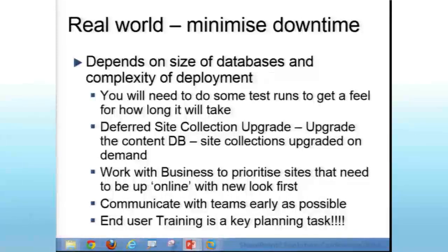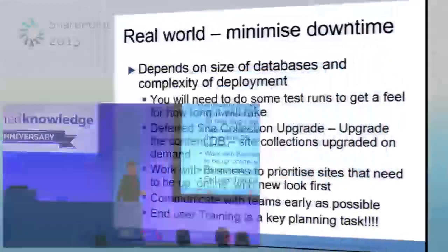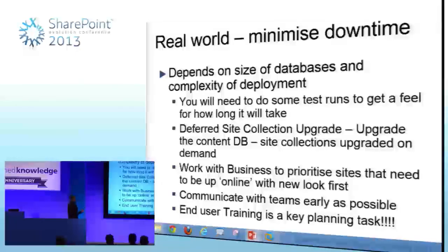Obviously, you need to do testing on how long it's going to take. There's no easy formula to say that content database is going to take 5 minutes or 10 minutes. You need to do a real-world test upgrade with real data a couple of times. I was working with a client to come up with the plan, and one of the things we did first up was bring up some VMs with 2013, put the content in, and see how long it's going to take. That way, you can get a log of issues that you've got and work through them until you're satisfied.